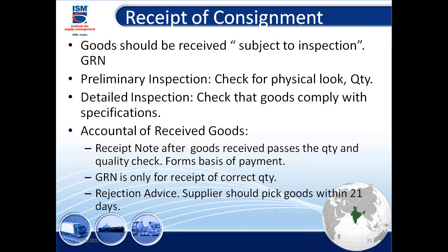They say, okay, 4 boxes. What is inside? Is it correct? Is it the correct quantity? Is it the correct quality? No. So then the preliminary inspection is checked for physical look and quantity. Then the detailed inspection is the one you will do. Check the specification. You need the right expert for that.